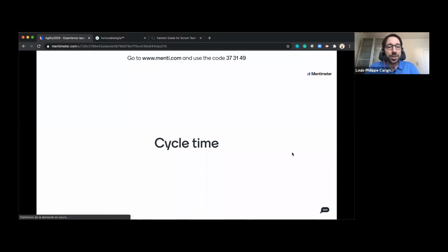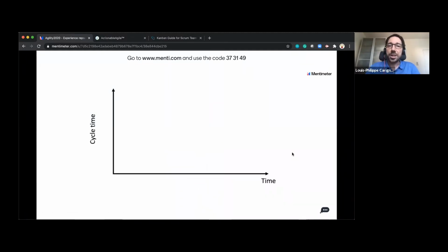So going back to cycle time, we're going to look at how we can use cycle time to forecast and follow one item in your sprint. On this new chart, on the x-axis, I'm going to have dates, which is the history of my project or my team. So here on March 5th, I had one story point bug, a product backlog item to keep it generic, and it took 12 days to be completed. So my first point says that on March 5th, it took 12 days to complete this item.